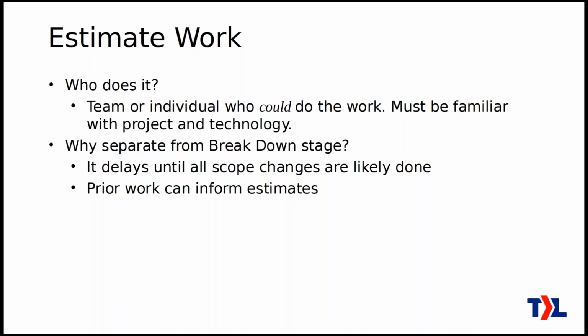And then the work on the earlier tickets can inform the estimates that you're making now. That's something you can't do if you do the estimation work all at once, all at the beginning. And so you're going to have more knowledge about your project if you let this wait until this particular stage in the framework.